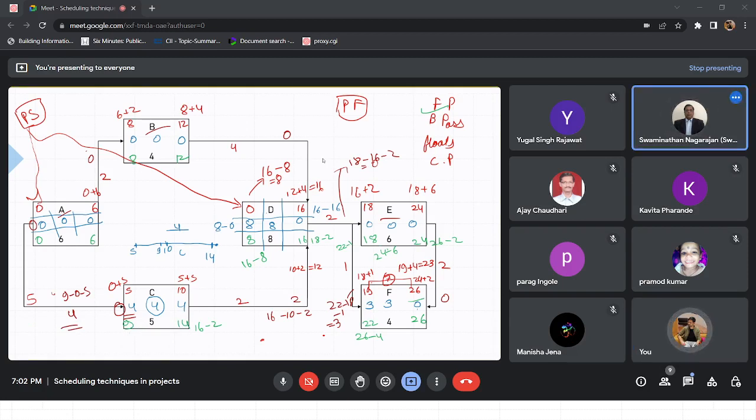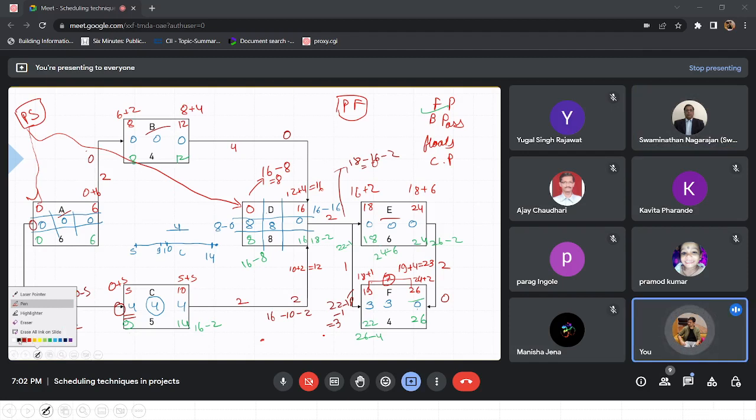Correct. And you will find that while looking at the activities in real time, we see that the total float is 0, this is critical. But the activities that give us more pain are where the total float is very limited, like 1 day, 2 days, because very easily those activities get delayed and those 1 day, 2 day buffers get exhausted. So now we will look at the critical path.